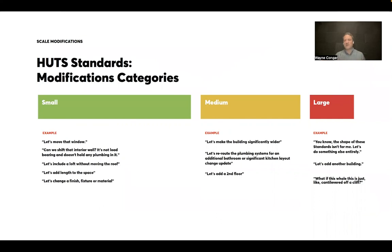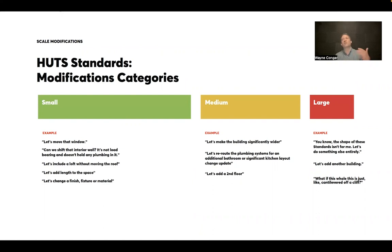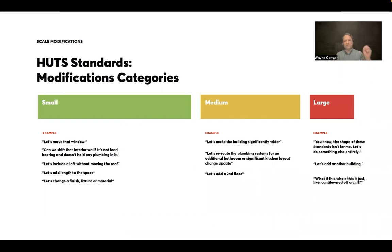But as we make those changes, where they have an impact is here in documentation, that you always need to go from these kind of design ideas and the kind of world of 3D modeling and the world of kind of defining the space into a series of documents that are required for permit offices and required for construction. And so if we get sort of very wild and very outside of the box here, it tends to mean that we're going to have some timing implication and cost implication downstream here in documentation. And so we kind of look and categorize our modifications in three groups, simply small, medium, and large. And I think one of the ways to think about small, medium, and large is not what we're changing, but the type of question somebody might ask. We've kind of gone through this many times, and we were able to bucket pretty typical responses that when people say, hey, I really, really love the small L, but can I do this?